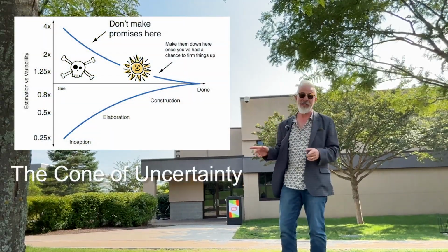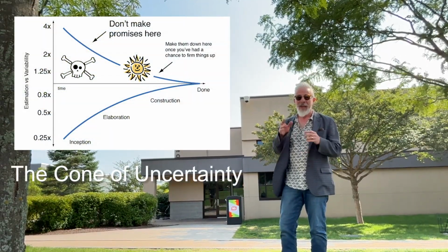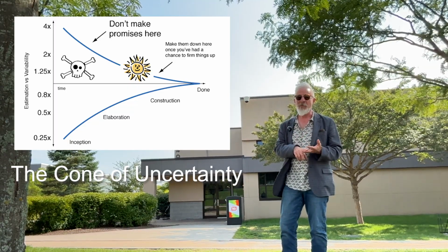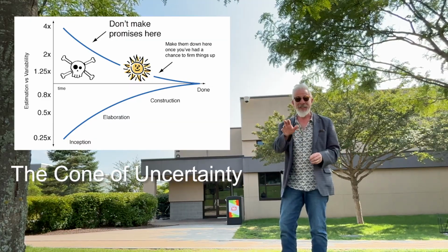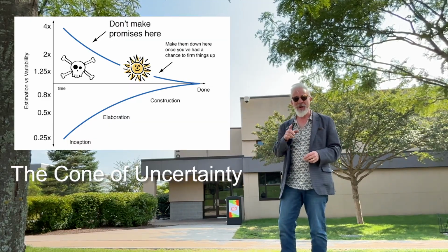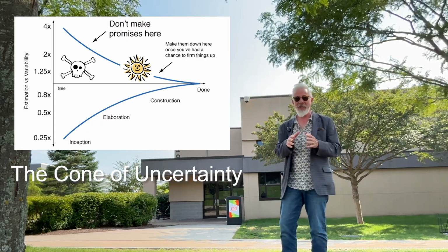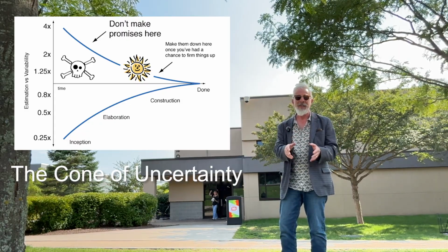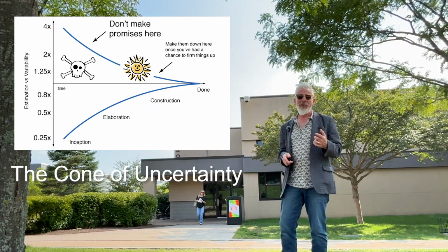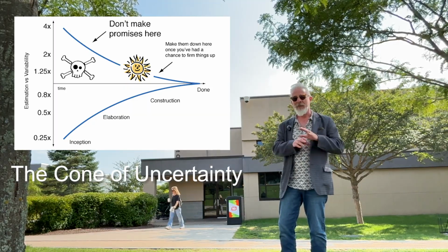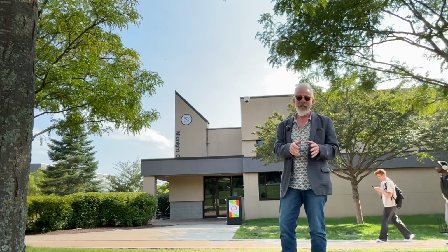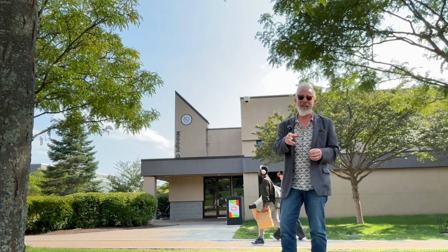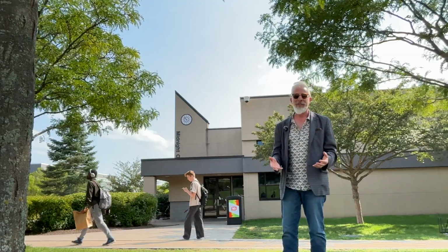In project management, there is a concept called the cone of uncertainty. At the beginning of a project, estimates for time, cost, and scope are really broad and really unreliable. And that's okay, that's normal. But later, as requirements are clarified, the cone starts to narrow and you can make more accurate predictions. Developing requirements and narrowing that so-called cone is how we move from vague guesses to realistic plans. And that's all about reducing risk and turning abstract goals into detailed steps that everyone can work with.